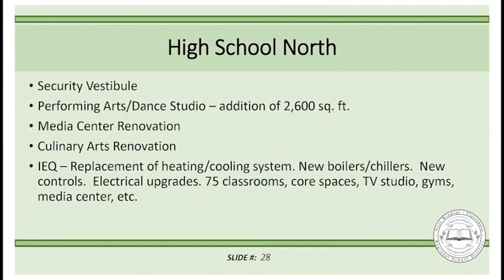So it's 2,600 square feet, behind the current theater. So it's outside, if you're facing the building, to the right of the facility. The media center renovation, the culinary arts renovation, and then IEQ, which stands for indoor environmental quality. And this is a complete overhaul: new boilers, chillers, controls, electrical upgrades. It's $16 million and change.